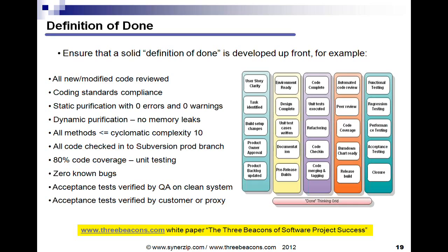Now once the software is out in the field in your clients' and customers' hands, obviously they're going to run some scenarios that you were unable to simulate adequately, or they'll just find bugs that the development team did not find. That's okay. Definitely keep account of those. But I've always said that you should start with zero known bugs as an internal measurement as part of your definition of done, and go from there and get as close as you can to it.